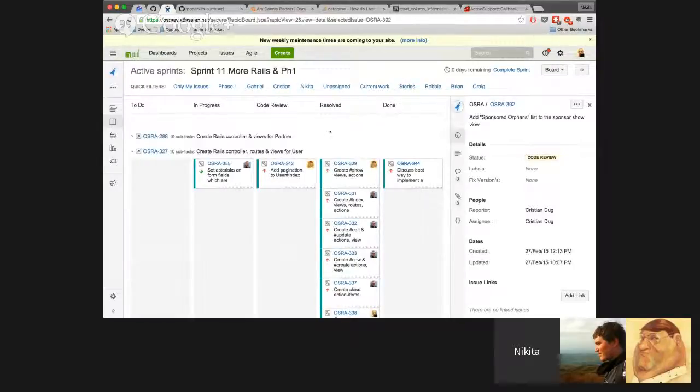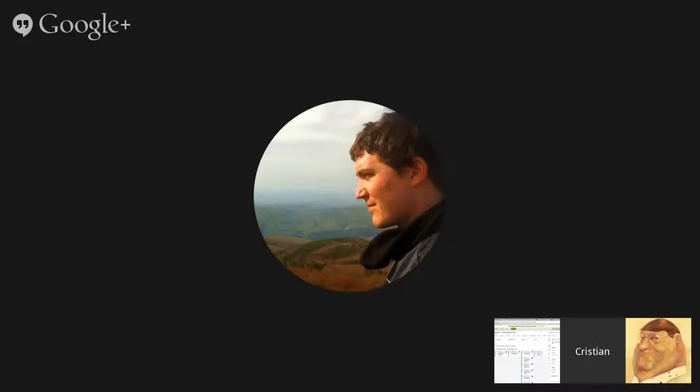Just whatever's next on the priority list, you take that, you work on it, you push it through from in progress to accepted, and then you start working on something else, and you just keep going like that. Kind of a continuous cycle. There are no two week objectives or anything like that. Yep, I agree. Okay, that's better.